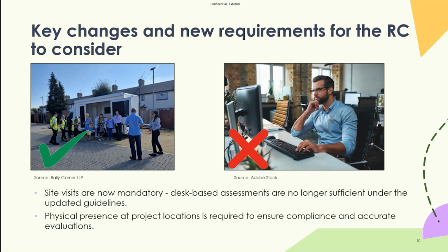It is important also to reference that the standard does allow for other professionals to undertake that inspection on behalf of the retrofit coordinator, provided that they have the competence and the accreditations to do that. And that really aligns with the requirements of the retrofit designer.